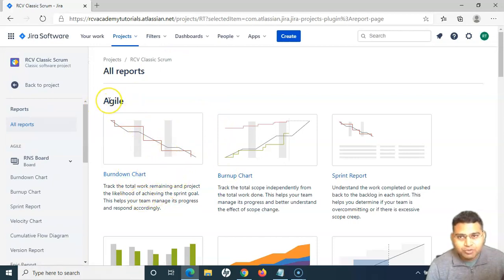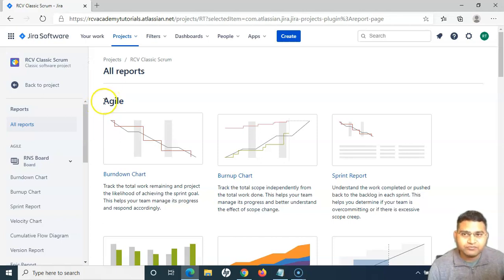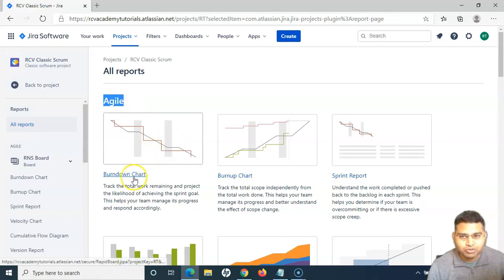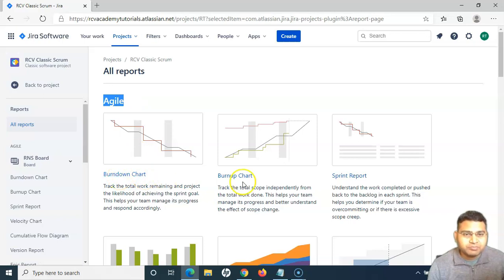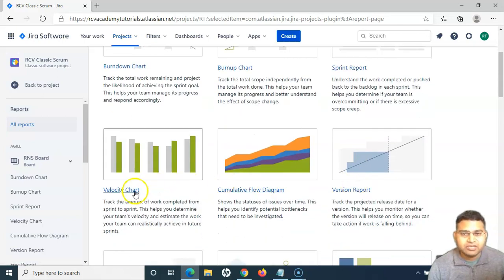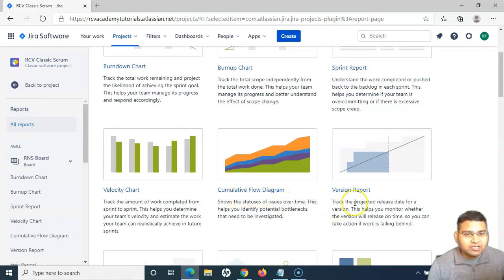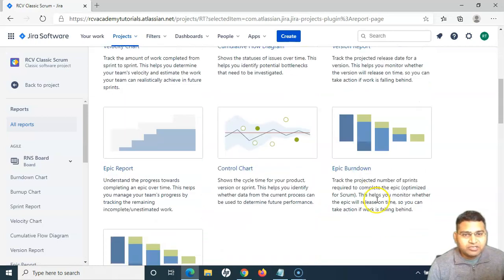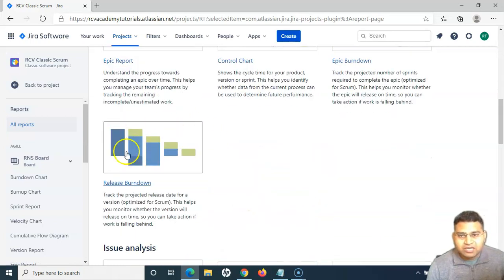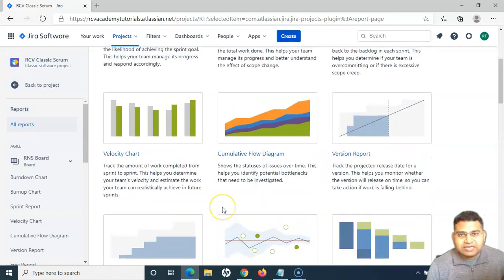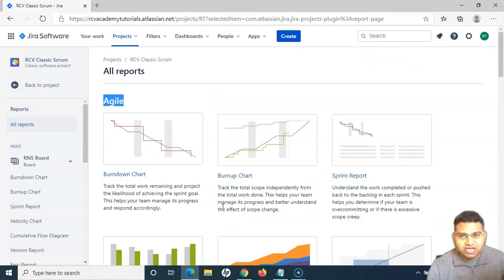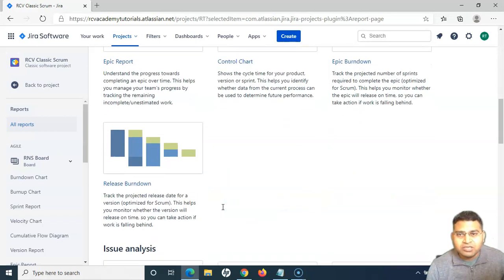Reports are mainly categorized into three categories. The first are the agile reports — burndown, burn up chart, sprint report, velocity, CFD, version report. These are all categorized as agile reports.